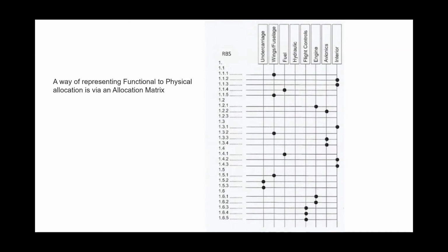I've also seen work breakdown structure elements being used. So it depends again on the ease with which you can deliver, justify, integrate and test a system. If your integration and testing requires you to make it product based, or element based, in my experience, then you allocate it to that. It's not written in stone what you allocate it to; it's what you can allocate and verify to. If you can verify it on a system, then you should allocate it to a system. If you can verify and validate it to a design package number, then you can do that as well. It depends on what you're allocating it to and how you're verifying and validating.